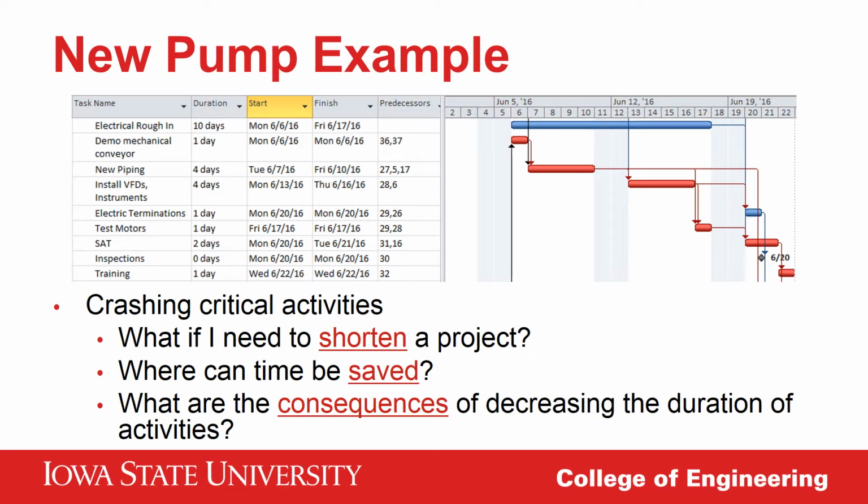I delivered the engineering activity list to the plant manager, and she identified production milestones for the plant, like inventory levels and shift schedules for the time of construction. Then she came back to me with an opportunity, as she calls things of this nature. Tank 600 is a large batch tank that will be out of service from demolition up until SAT, or site acceptance testing. No production can take place in this vessel at this time.